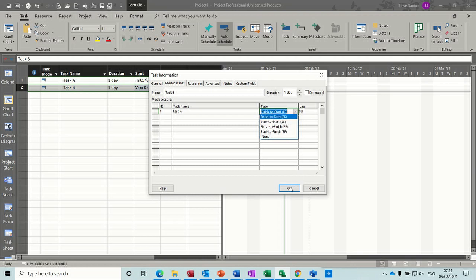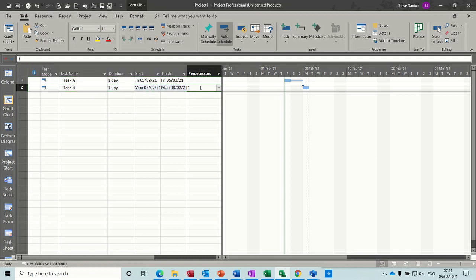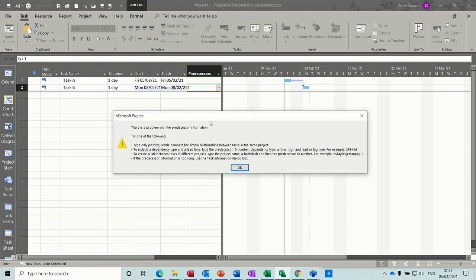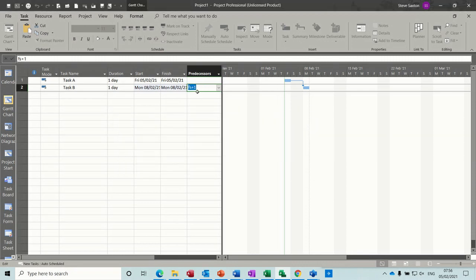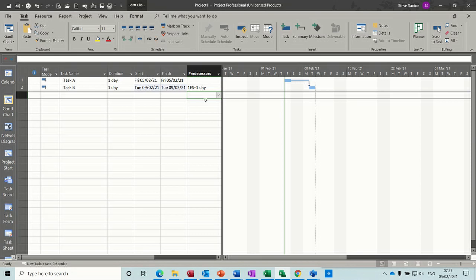So, if I click OK to that one, what I would have to do to put a one-day lag on here, I would have to go 1FS plus 1. And then you get the extra day lag.